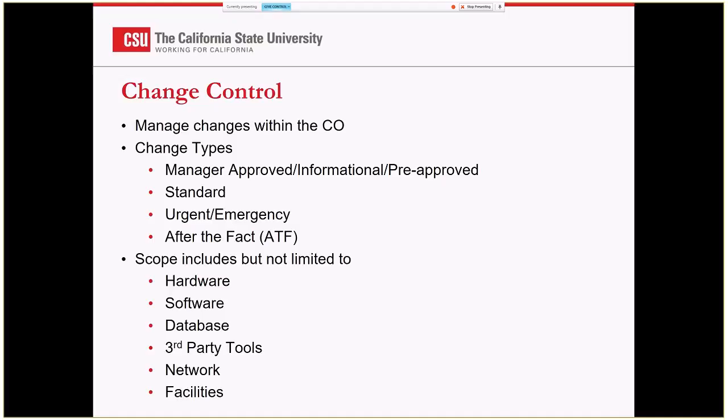A standard request is basically a standard request that may require some outages. We have to give a leeway of about a week for anybody that may have a task on this change request to review, for the managers to review it and approve it, to allocate resources to it. Part of change control is to manage changes, assess risk, and to make sure that we're not doing too many of a certain type of change at the same time.